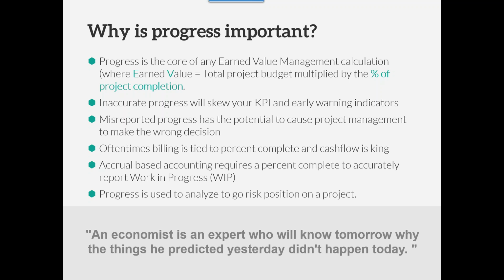And then finally, coming back to my risk roots, a lot of what we do in the risk programs is, if you're only 5% complete on a job versus 95% complete, the risk profile on that project looks completely different. And when you come up a level, there's usually a large contingency bucket on high risk projects that is tied to these projects, and being able to put that money to work in other areas is core to being able to grow a business.